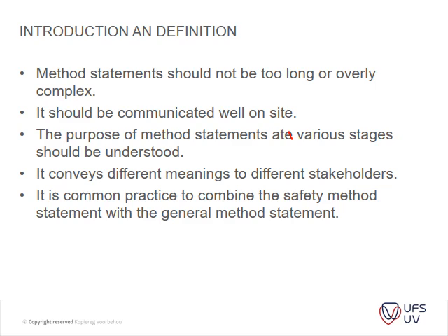For instance, now the examples that I've gone through for your pre-tender stage method statements, it doesn't help going into it in too much detail because you don't have the time and money to go into it in too much detail, and because you also don't have all the information yet. Maybe the client or the engineer will come back and say, but you have to use a concrete, or you can't use the concrete pump. You need to reverse your trucks in and go out again. So that's the stuff that you need to consider.